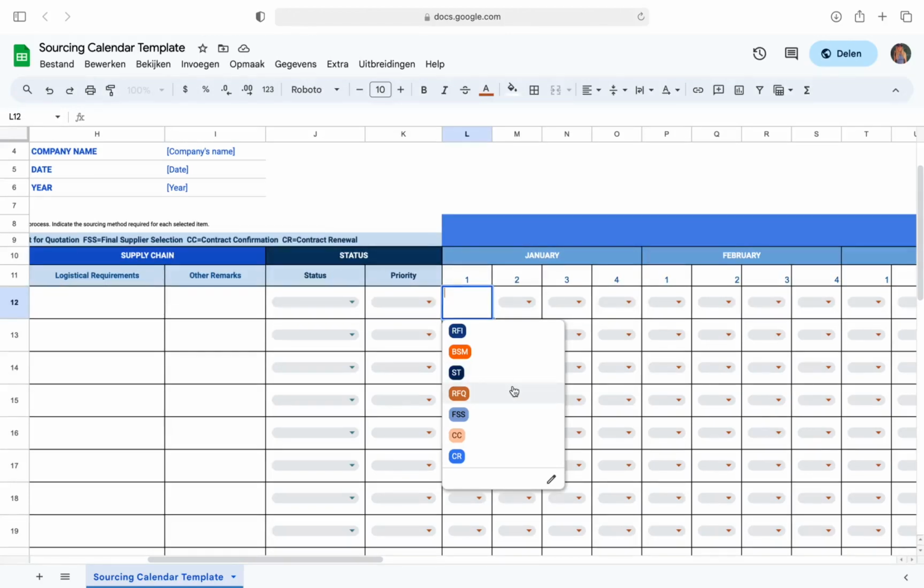When everything is to your taste and standards, you get an RFQ, a request for quotation. Look at the offer and how much they cost. Make sure to compare those prices to what you estimate them to be before requesting the RFQ. If necessary, and if you can, get your negotiation tactics ready, because you'll be needing them for the next step.